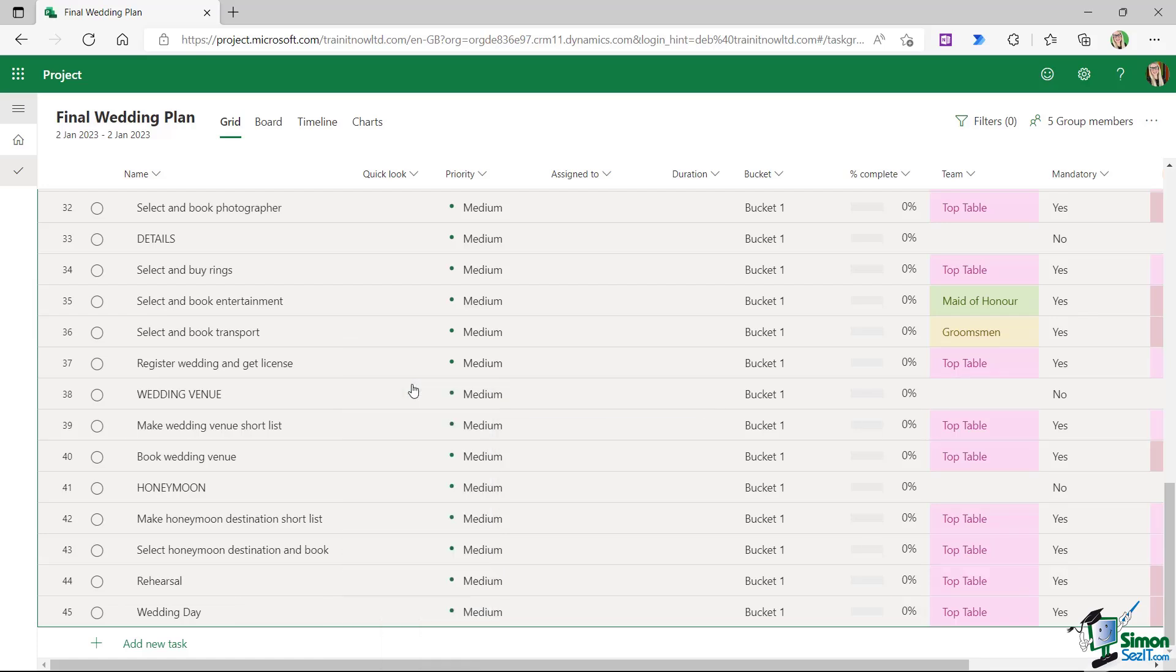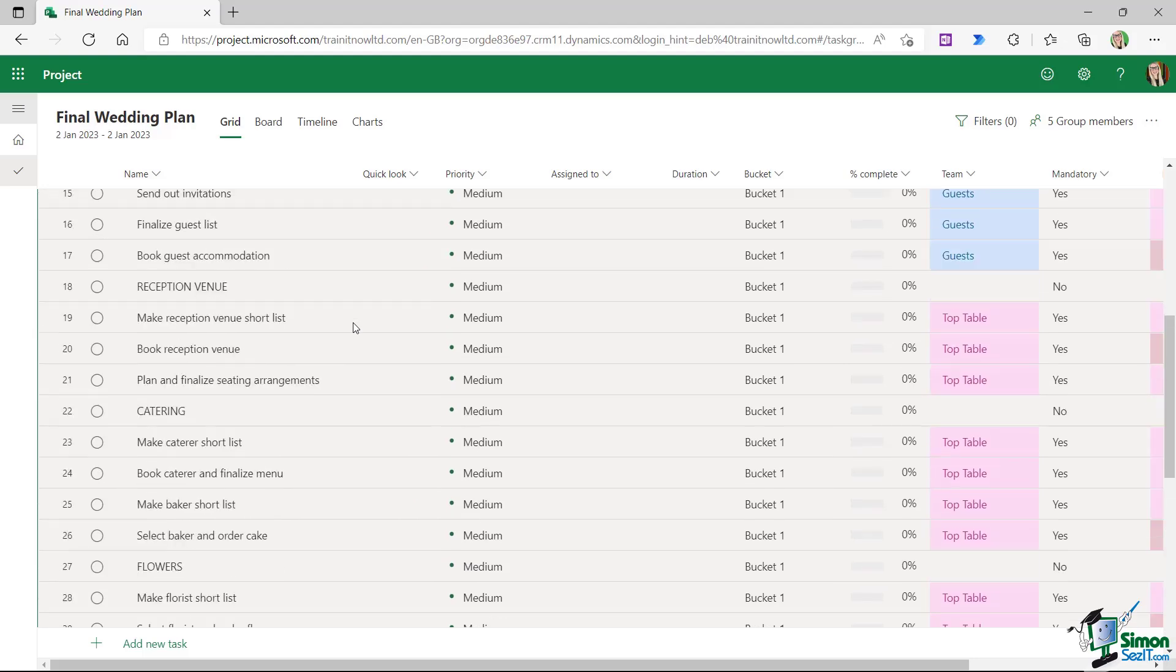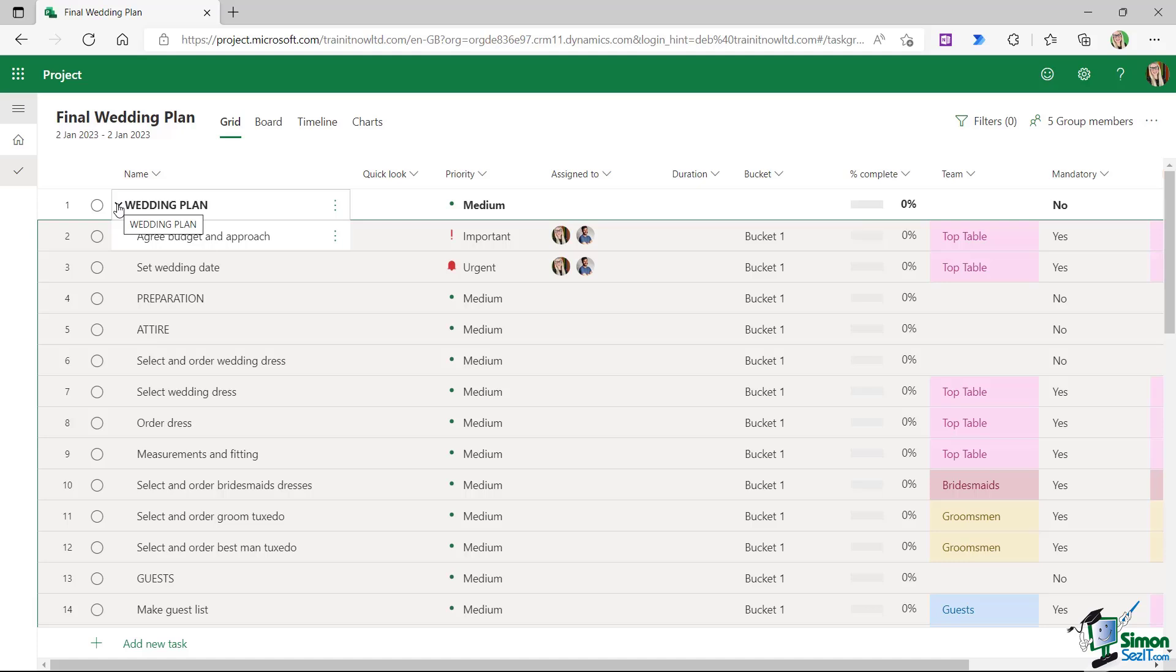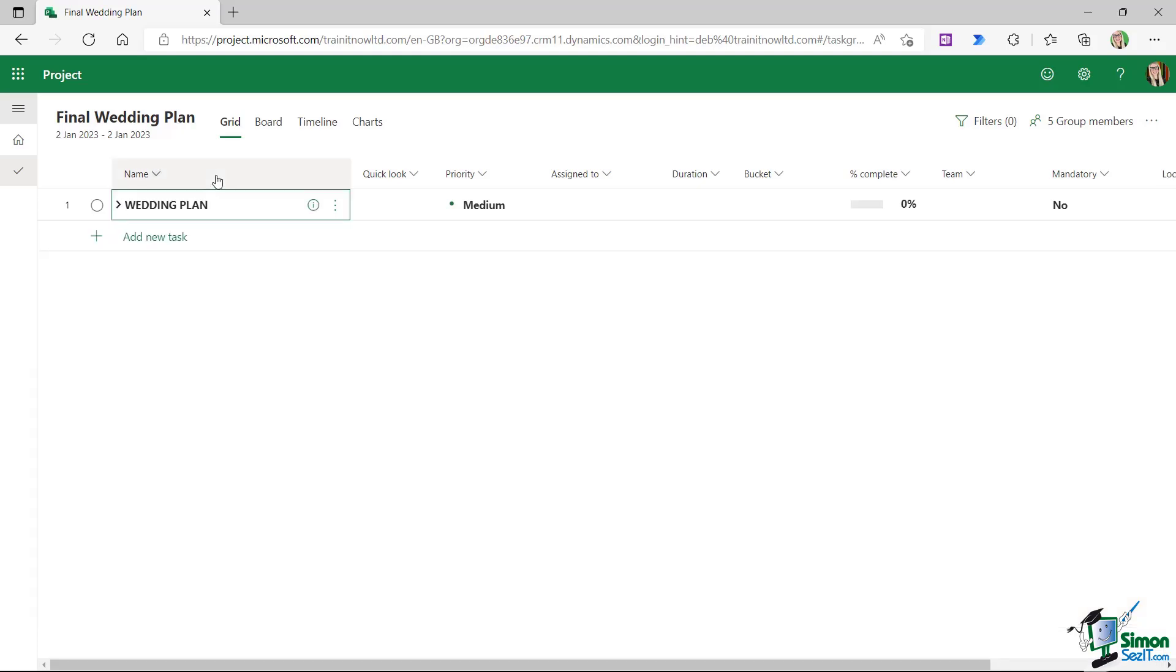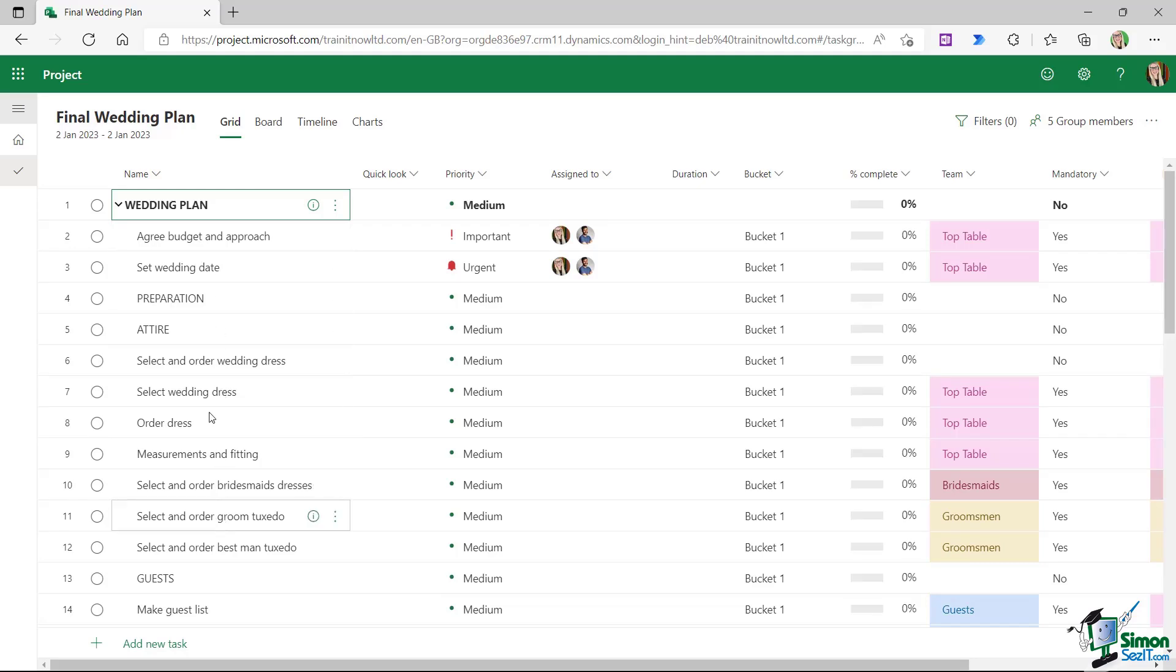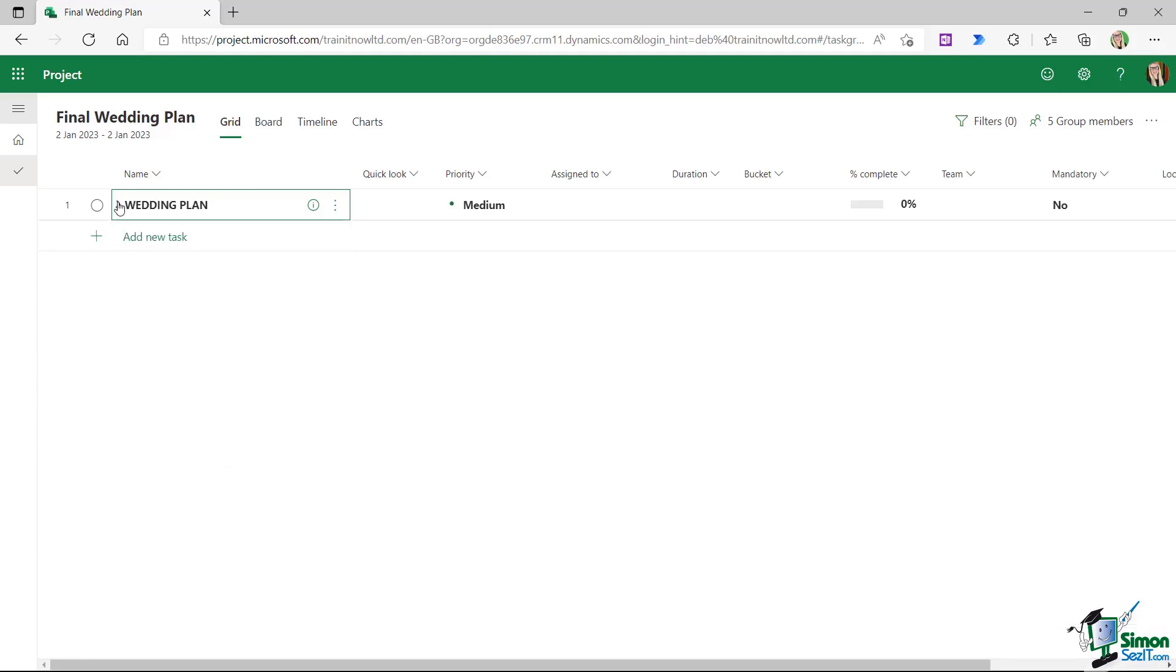Now what you might have noticed there is that these tasks have indented very slightly. And if we scroll all the way back up to the top of the project plan, you can now see that wedding plan is showing in bold with this little collapsible and expandable arrow. So this means that I can click on this arrow and it's going to collapse up my entire project plan. And the reason why I like to have this here is because when we start adding in durations for these other tasks, it's going to reflect in this top-level summary task. So I can see exactly the duration of the entire project because it will be the duration of every single task in the plan.